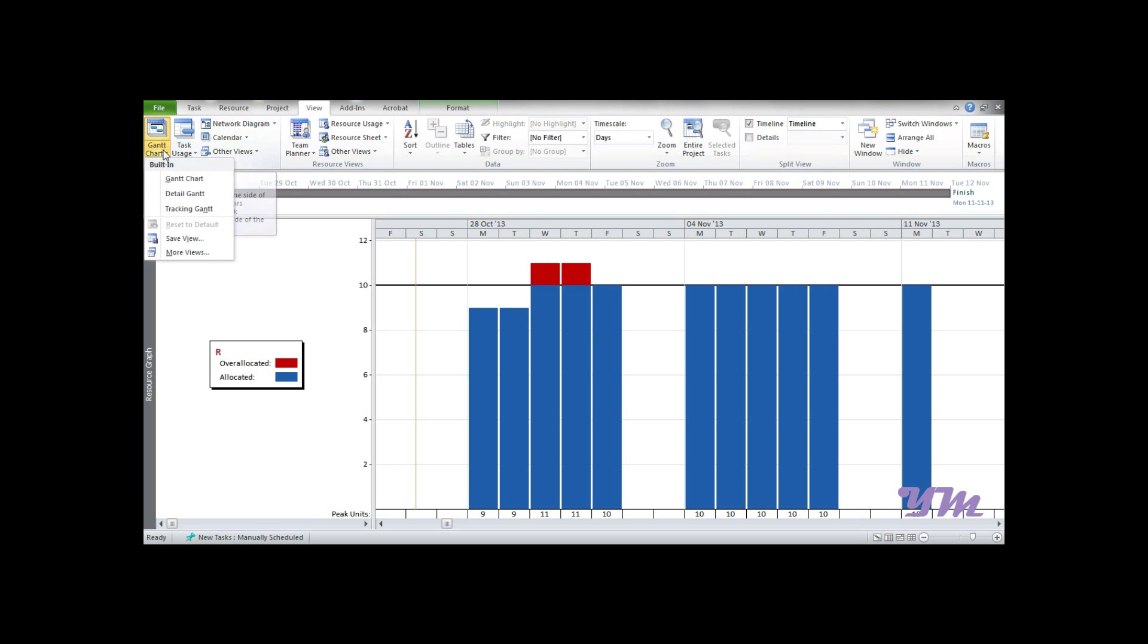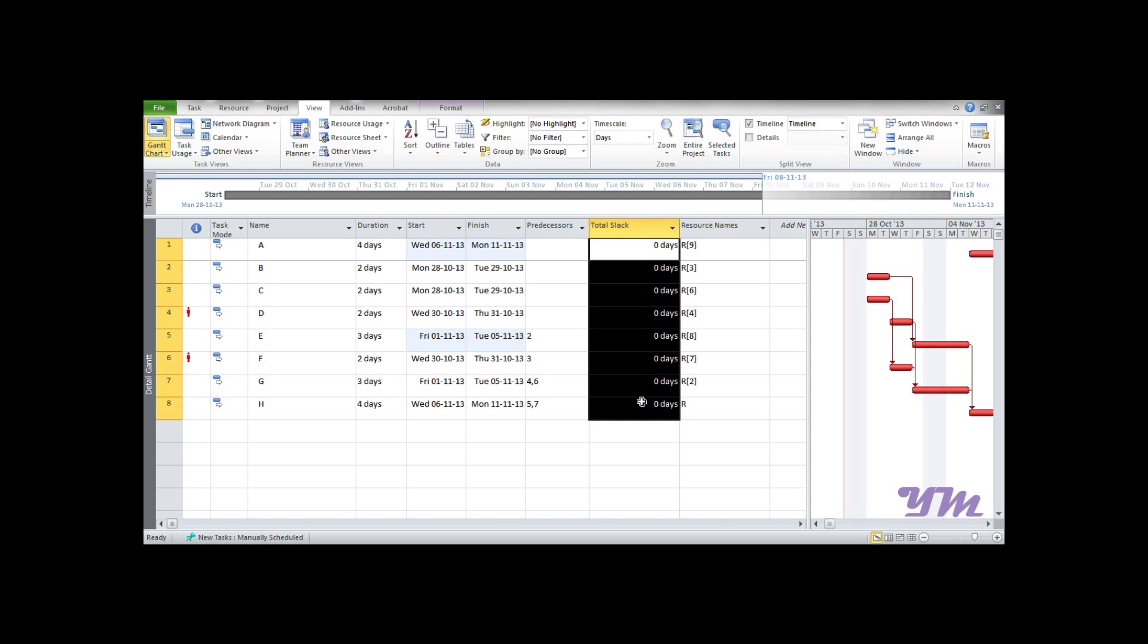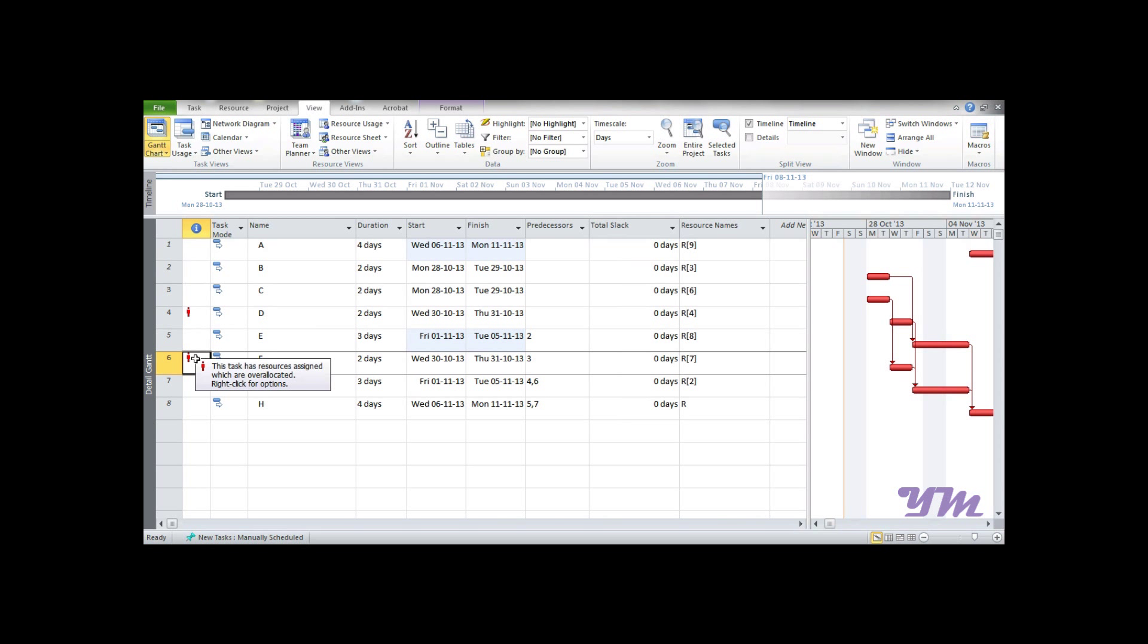Getting back to the Detail Gantt, you can see available slack is zero - all slack is consumed to balance resources. Still, these two red markings indicate resource is required more than allocated. One option is you can increase the duration if possible, or reduce the demand for resources to complete that work. This is all about resource leveling in Microsoft Project 2010.